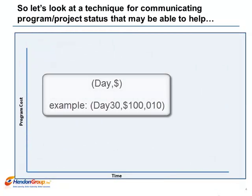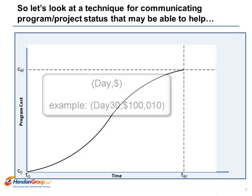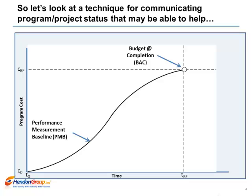Key initiative or program status can be described in two dimensions: time expressed in duration, and cost expressed in currency or hours. If you apply the cumulative program cost for all planned work over the planned duration, you get an S-curve. This S-curve is known as a performance measurement baseline, and the point at the top of the curve is the budget at completion — for example, $1.4 million over 14 months.